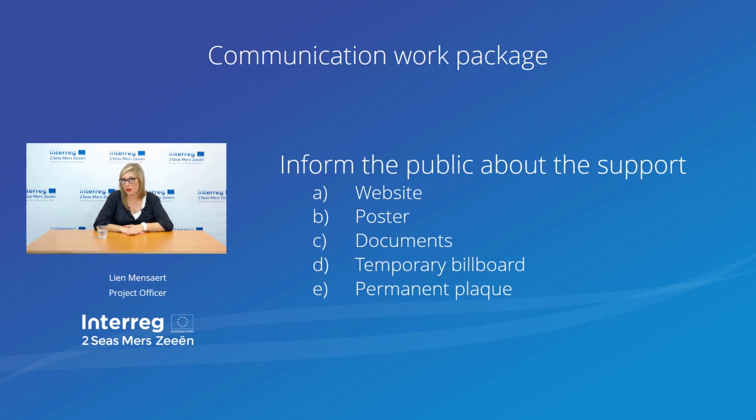It is, however, mandatory to have a poster with the name of the project, the program, and the partner organizations that is visible in every partner organization's premises. You will also be asked to put the logos and the publicity requirements on all of the documents that you will produce for your project. And then, in case there is an investment for your project, there will also be mandatory items to respect, as there are temporary billboards and a permanent plaque. So I do refer again to the program manual, in this case to fact sheet 14, where you will find all of the necessary information about these publicity requirements.